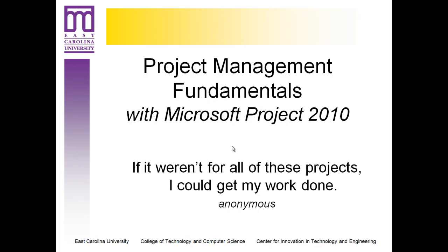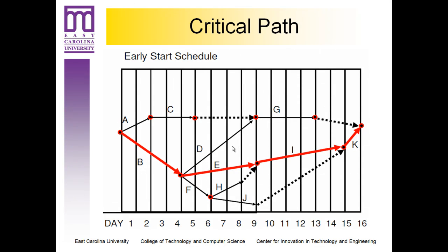Now, the technique we've been using in Microsoft Project is referred to as the critical path method, and we've been using something referred to as an activity on node network diagram. What we see here is a representation of the activity on arrow network diagram, and very simply the only difference is that instead of using nodes to represent activity A, B, C, D, E, etc., we're using arrows. And in this case, the arrow for activity B starts on day 0 and extends 4 days.